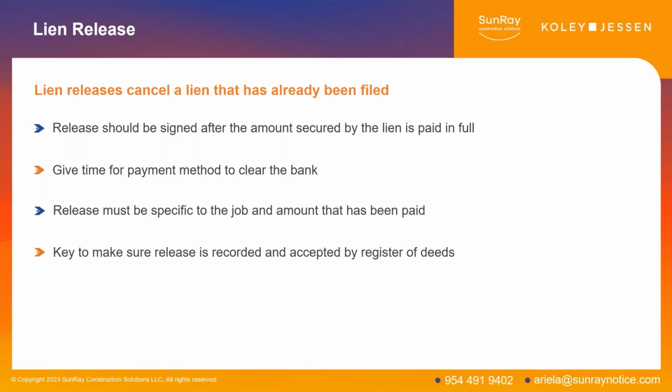So this isn't something that you simply want to hit the file on, not look at any of those emails and just assume that it was accepted. You can run into problems if you think you've recorded a release and you haven't. So be aware of those details and make sure that the release has actually been recorded and accepted.